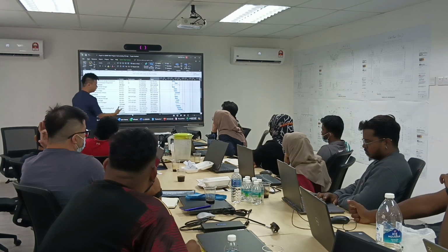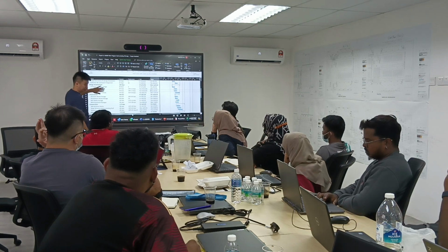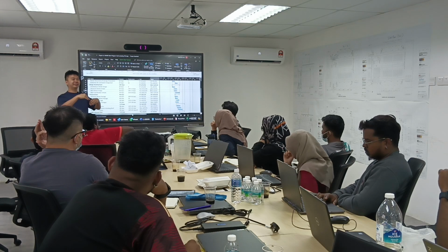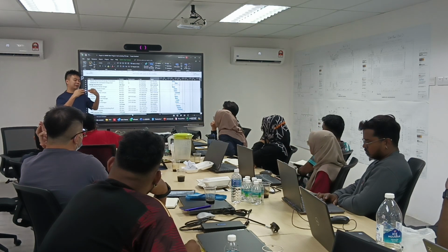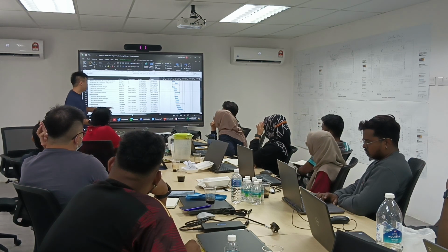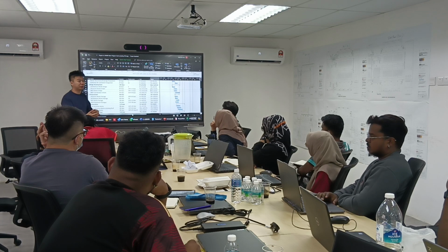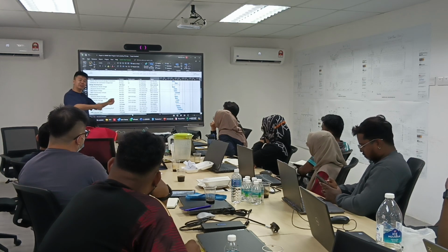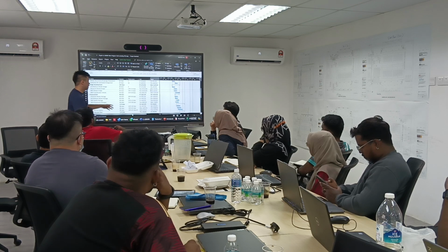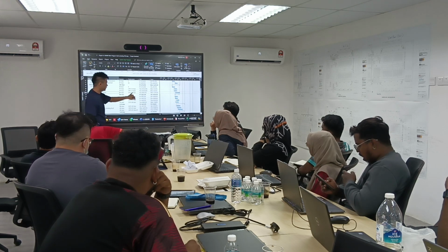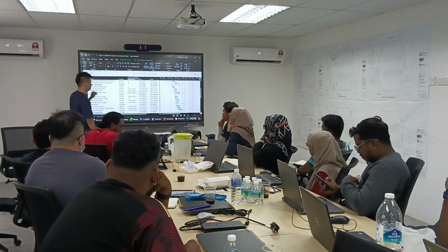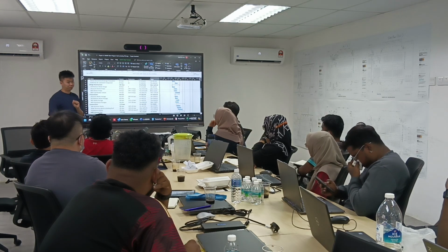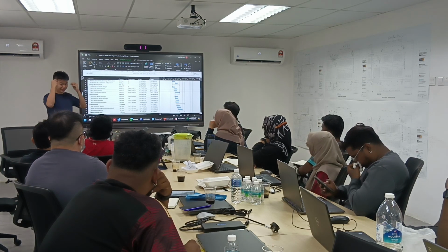Which means in about February, most of the drawings are already there. As the person running the project, you wouldn't want to wait for all of it to finish before you start coordination, because it doesn't make sense. Once you have most of the drawings, you can already start the coordination. That's why they program it as 21 FS minus 30. It means this date minus 30 days, then I start. This is what is in their mind.